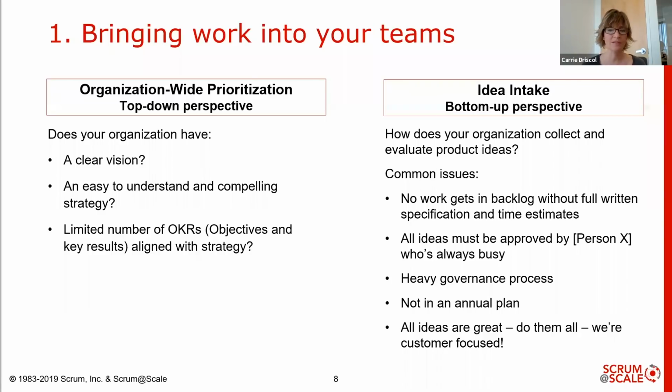From a bottom-up perspective, you may see issues if you have teams and programs trying to work off of a PMO-type governance model. Something like needing fully estimated PRDs or BRDs, product requirement documents or business requirement documents, approved before starting work on any aspect, or in some cases, once written, estimated, and approved by one layer, having them now have to get into a queue for the approval of a committee who only meets once monthly so that they can then discuss and approve if that item should move forward.